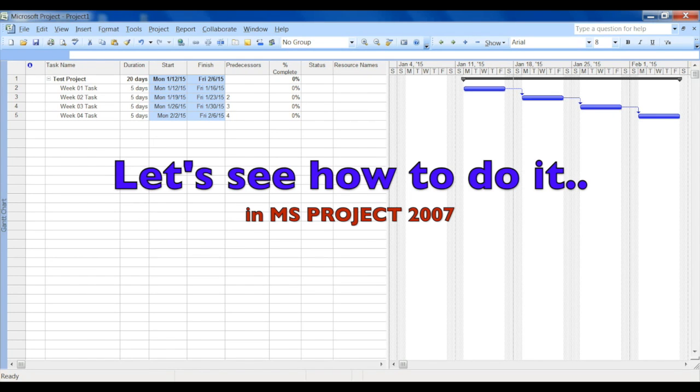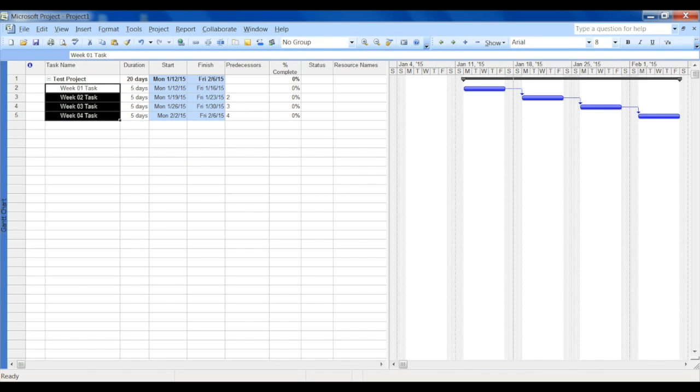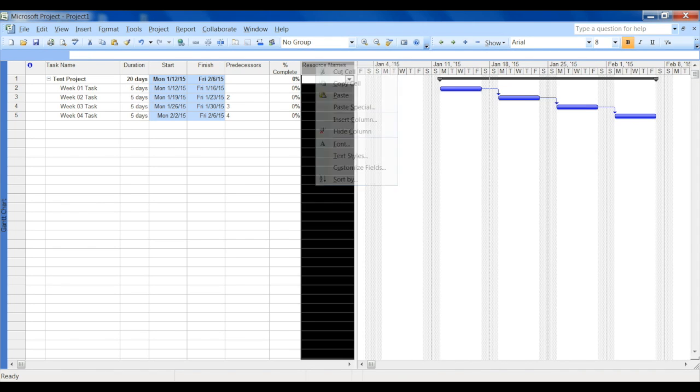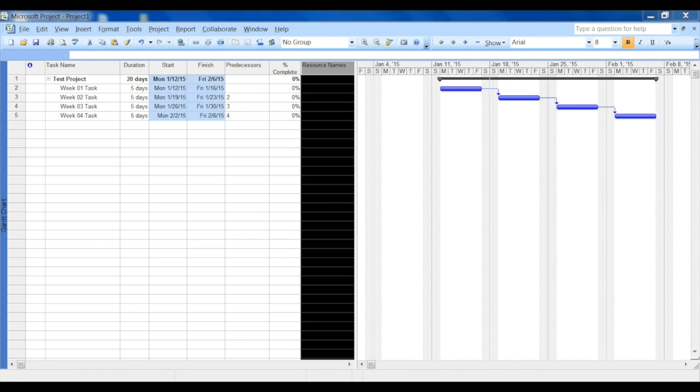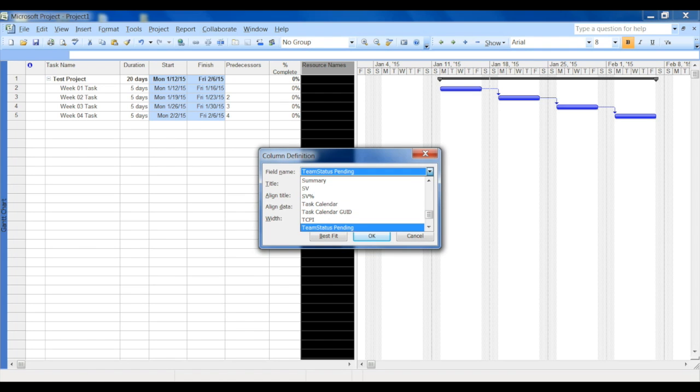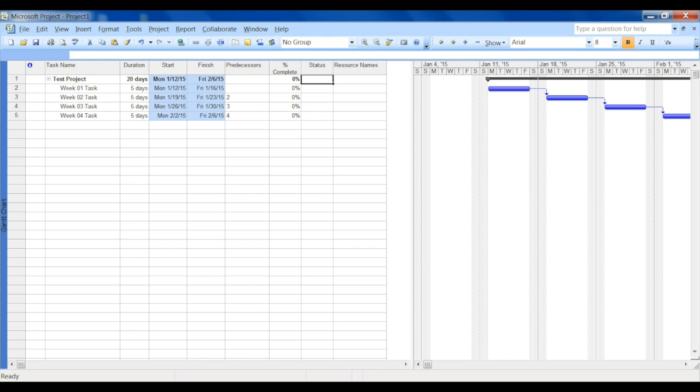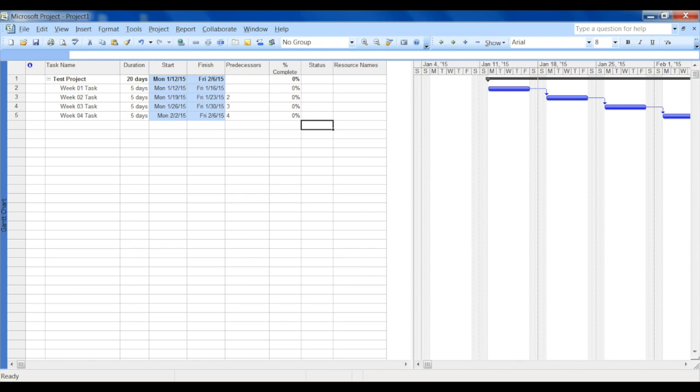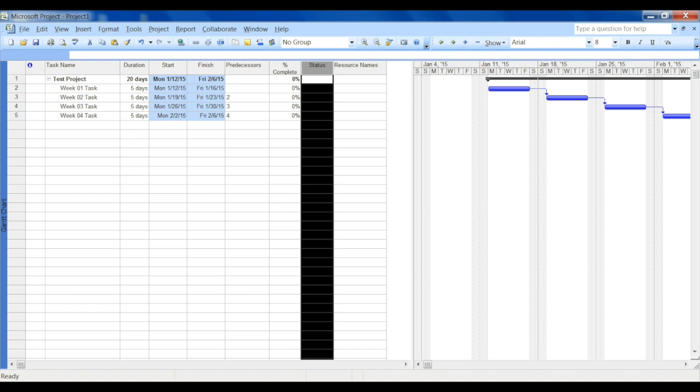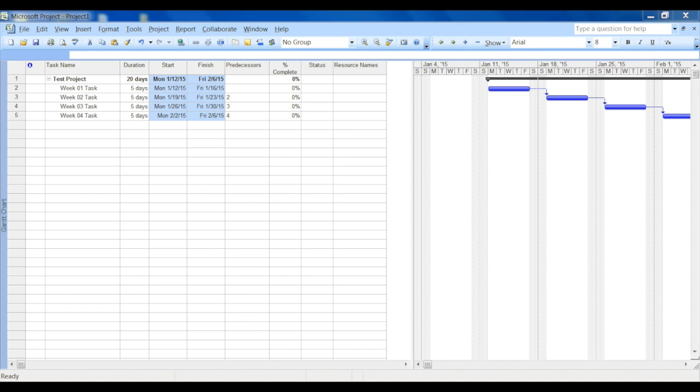I created a sample project here called Test Project and I created four tasks, one per each week with five days of duration. I'll insert a new column which should be Text1 and I just named it as Status. Now here I want to see some kind of indicator in this field, so that's what we are going to put in using our formula.